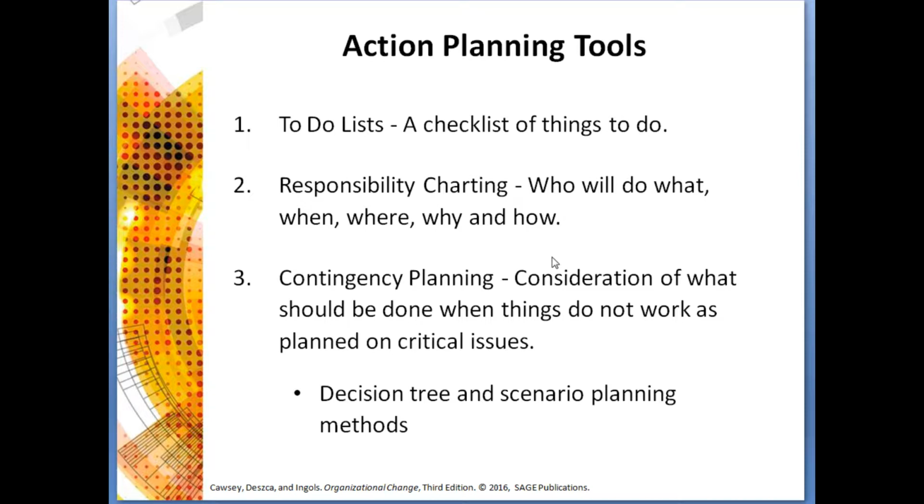Okay, these are the to-do lists for people. Who's the person? What are they going to do? And when are they going to do it by? And by the way, if they give you the I-don't-know-when-I-can-do-it-by answer, then you as a leader should push back and say, okay, when are you going to know? So you have the action to do this thing. When are you going to be able to have this thing finished? I don't know. Okay, so when are you going to know when you're going to have this action finished?